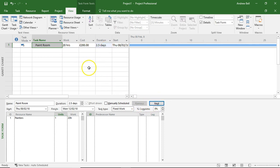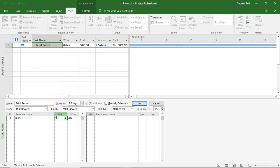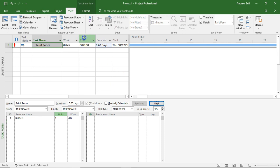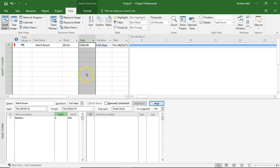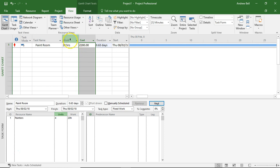20 hours of work. Now, the interesting thing to note here is it doesn't matter how many painters I put on the task, the cost stays the same because the work is fixed at 20 hours.